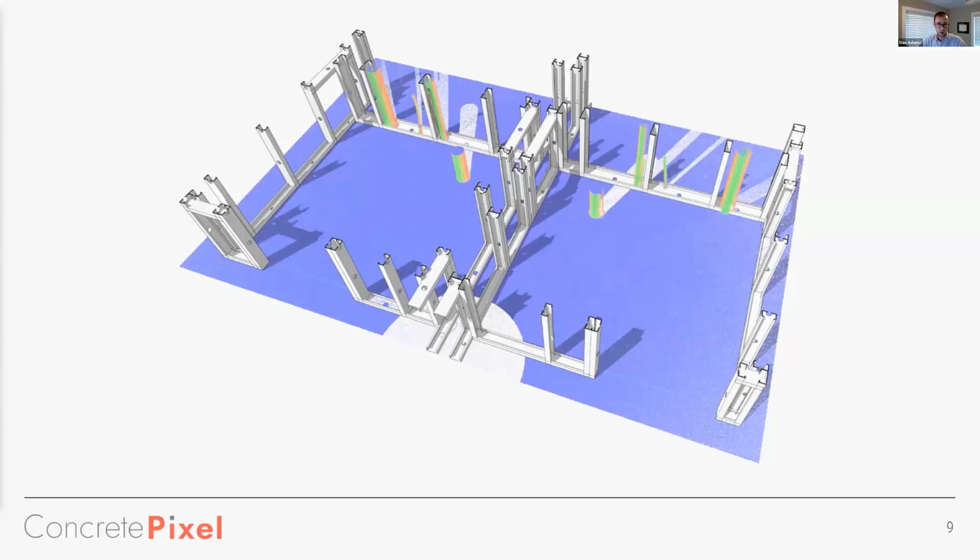So as most of us know, framing follows the actual construction. Framing will follow slabs and foundations. So traditionally, the lack of a framing model in BIM and the speed of this stage means coordination pretty much just doesn't happen at all. Issues are dealt with as they arise in the field, or things are constructed and you backtrack, kind of repair and replace. So by marrying a scan slab with a framing model, you can actually avoid slowdowns during installation.